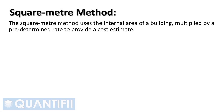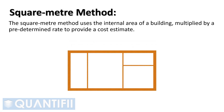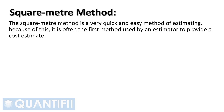Let's work through the square meter method — how to use it, its advantages and disadvantages. The square meter method uses the internal area of a building multiplied by a predetermined rate to provide a cost estimate. When measuring the internal area, all walls, lifts, ducts, etc., shown on plan should be included in the area calculation. The square meter method is a very quick and easy method of estimating; because of this, it is often the first method used by an estimator to provide a cost estimate.